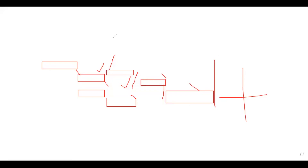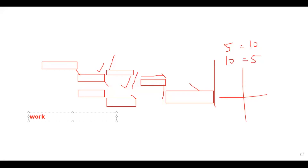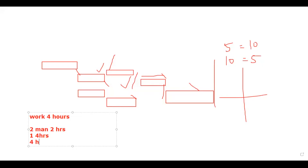What is crashing? In crashing, you reduce the time required to complete a certain activity by adding more resources. For example, if an activity completes in 10 days with five helpers, and you increase to ten helpers, the duration is reduced. Simply put: if one person completes a task in four hours, two people can complete it in two hours, and four people can complete it in one hour. Crashing means applying more resources to get a reduced duration for a specific task.